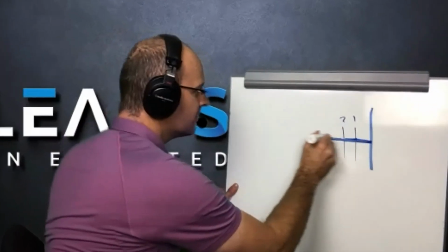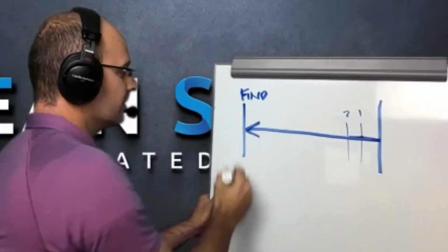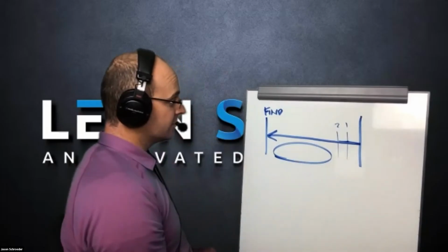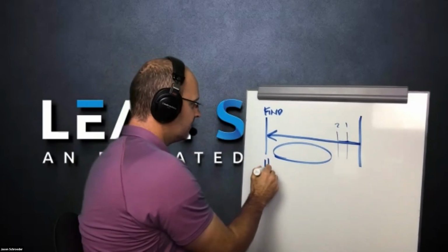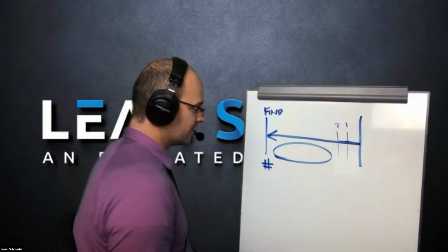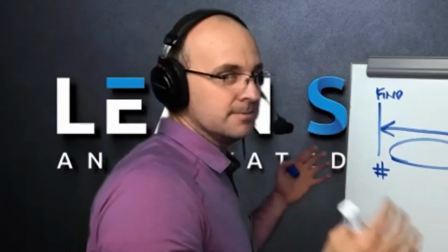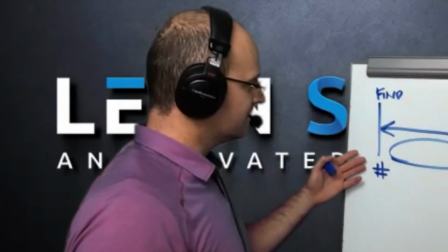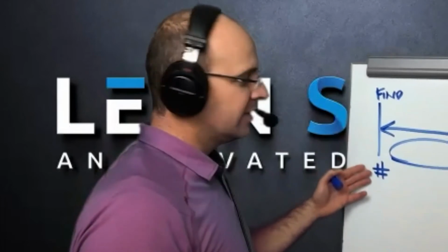We want to increase the time that we find them, because if we can find them earlier, we have more of a space here in the middle to do something about it. Actually, there's a way to track that. So if you find roadblocks, you can write down the number of days until it will actually impact work. And if you track that average on a daily or weekly basis, that number should be getting bigger, meaning you should go from 1 or 2 days to 5s or 6s to 3 weeks. Hopefully we're at least 3 or 6 weeks ahead finding roadblocks.